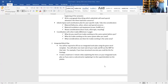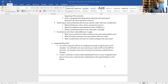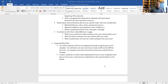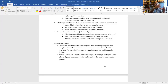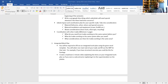The next thing is the integrated work plan. You'll be required to fill out this IWP template, and then create a maximum two-minute video explaining the items on your integrated work plan as if you're a subcontractor explaining it to a superintendent. You'll need to choose one big task — if you're structural concrete, maybe it's your spread footings; if you're mechanical, maybe it's your ductwork or your air handler units. Then do the integrated work plan based on that task. You may want to do a screen share video like this.